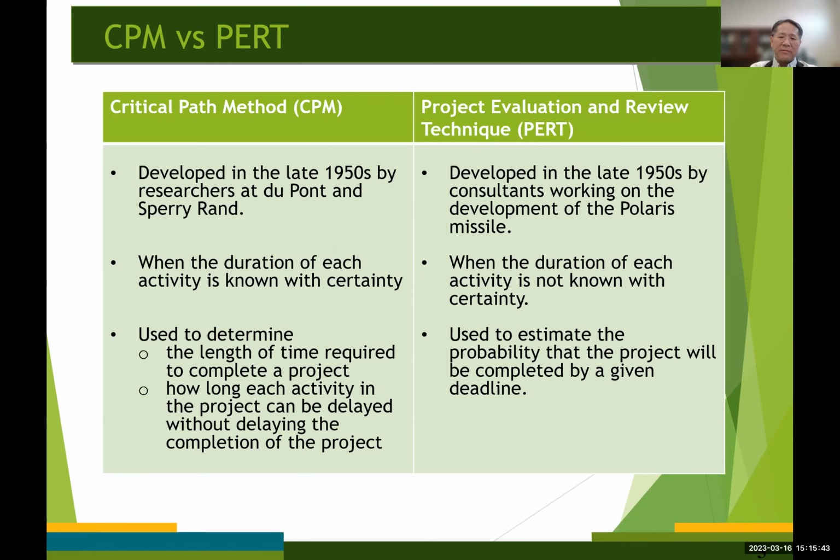So they developed a model for the time-cost problems. And they demonstrated that focusing efforts on the critically important activities could reduce time without significantly increasing cost, instead of recovering lost time with a bulk of labor.